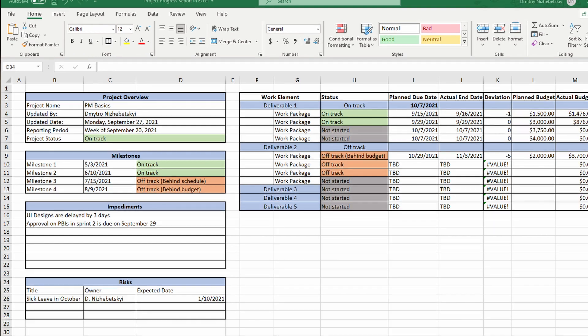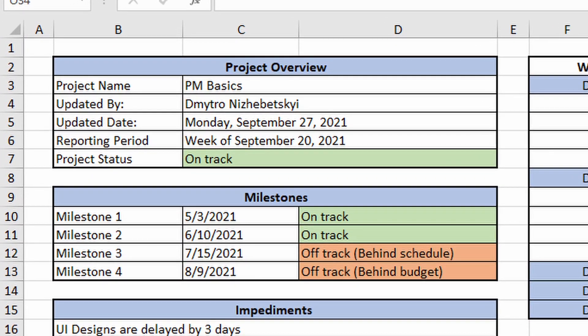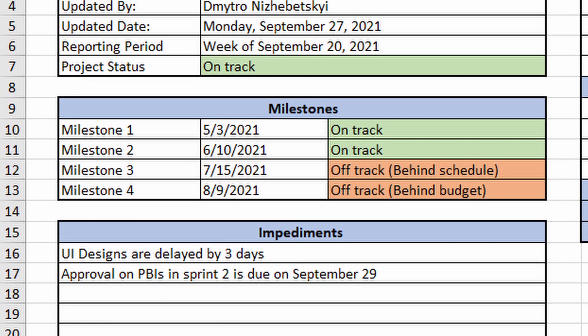First, we have a section with the project overview. Here we have the project name, updated by, and updated date — so we know when this project progress report was updated and by whom. Then you want to include the reporting period, usually a one or two week period during which you did some work. And last but not least, the project status — it should be one quick at-a-glance indicator like on track, off track, behind schedule, or over budget.